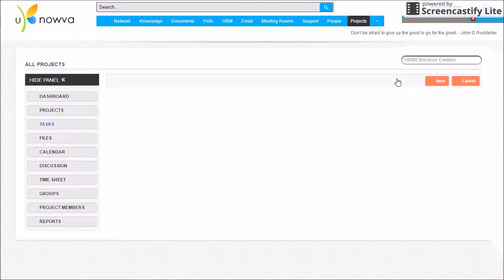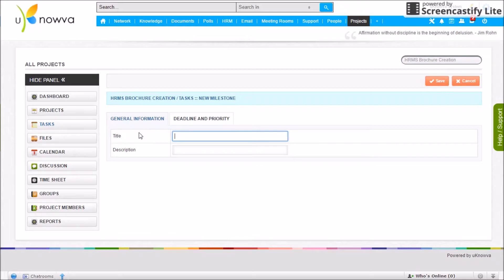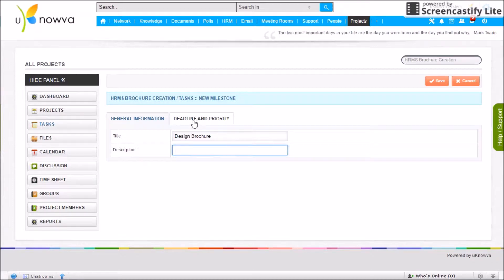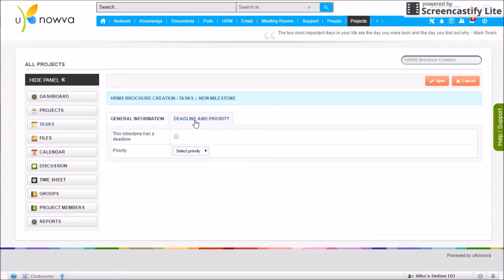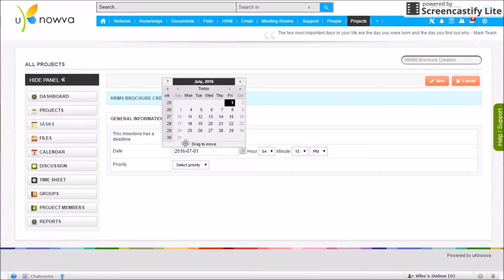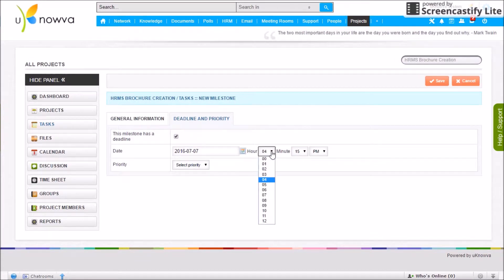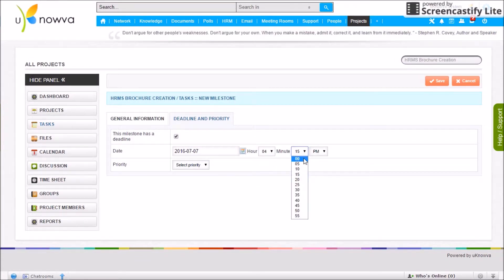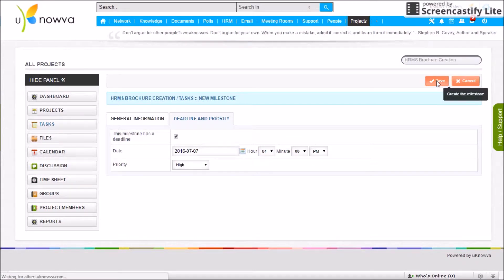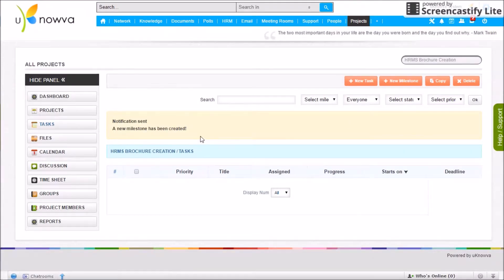There are no tasks or milestones for the new project yet, so start by creating a new milestone. Enter the title and description for the milestone — description is optional. On the next tab, set the deadline and priority, then click Save and the milestone is created.